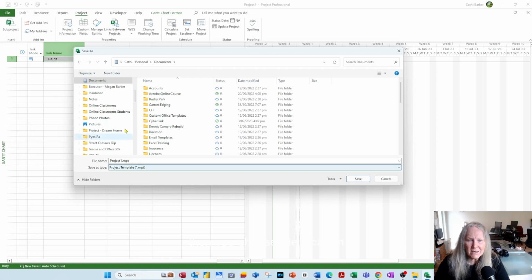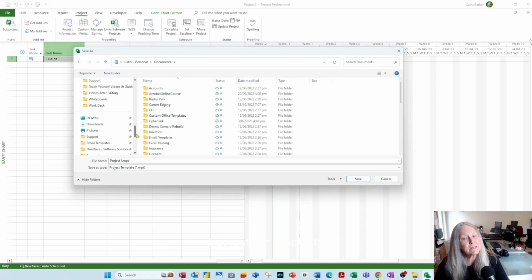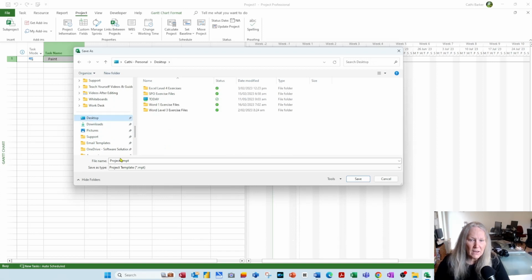When you choose project template, then you choose the location you want to store your template. And of course, that's going to depend on your organization, but just for simplicity today, I'm going to save it to my desktop. As far as naming the template, again, decide what you want to do, but I personally like to go M/F, which means this is a Monday to Friday, 6A/6P. This is a Monday to Friday, 6 a.m. to 6 p.m. template. That way I can have a Monday to Friday 7A to 7P, a Monday to Friday 9 till 5P. I can have different types of templates for different types of projects, and I need this to be quite descriptive. So I'm saving it to my desktop as a project template called that, and I go save.